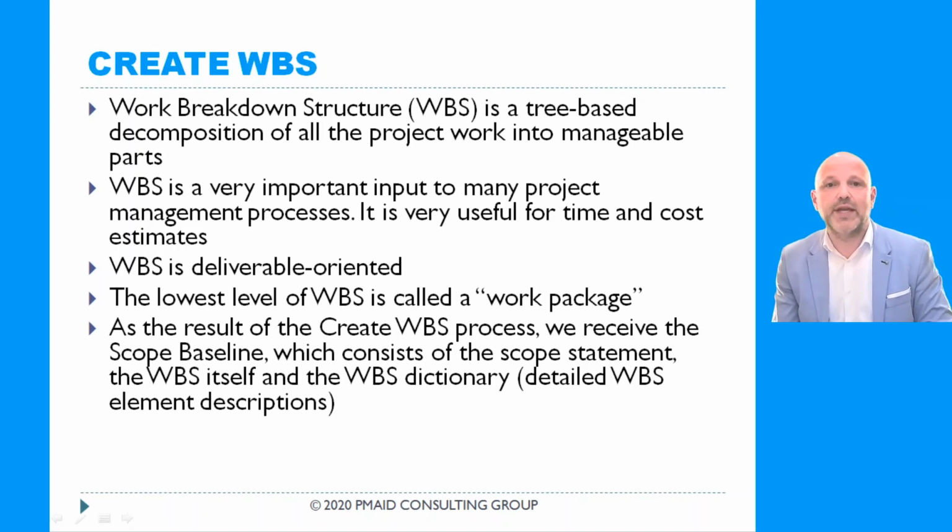As a result of create WBS process, we receive the scope baseline. So scope baseline consists of the WBS itself, of WBS dictionary, which is the description of each work breakdown structure item, and it also includes the scope statement, the document that we have just discussed.